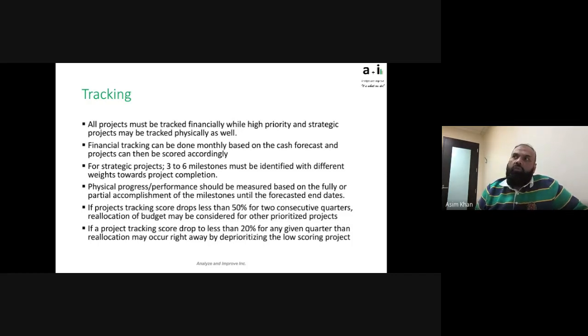There are projects which are not construction related, like for example IT implementation, where IT guys will also have very good milestones. In the mining world, the problem would happen with projects which are betterment projects, or projects investing capital for development of the mine, development of the ore body, which is harder to have milestones because you usually do not have mobilization or demob or commissioning of these kinds of projects. So in that sense, what you want to identify is maybe a drill footage or some kind of milestone which says how are we progressing based on where we're supposed to be, right?